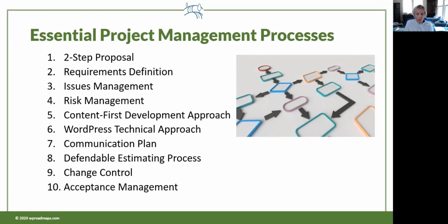A content first development approach. Those of you who've been watching for a while know, no development till you get all the content. If you do it, everybody tries it at least once, and it's always a train wreck. And I'll tell you a little bit more about that in a minute. Your WordPress technical approach. You need a starter site you can just spin up and then make the changes to it that already has your plugin stack of your preferred and tested plugins that work well together. You need all of that. That's your technical approach. At the very base level, there's a whole lot more to it.